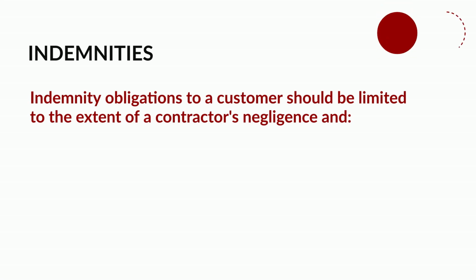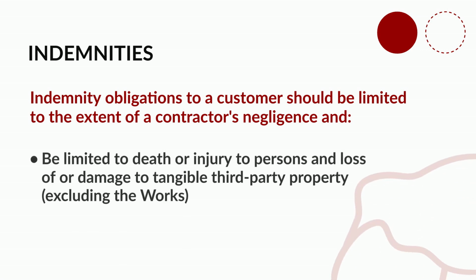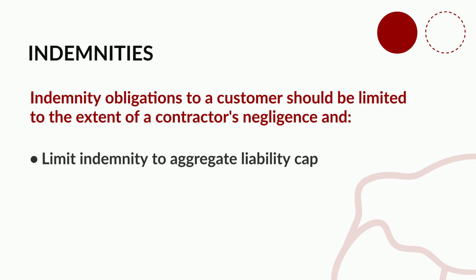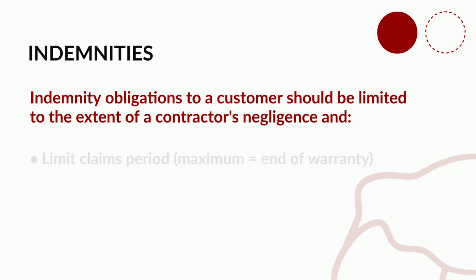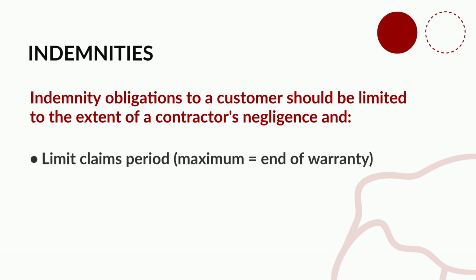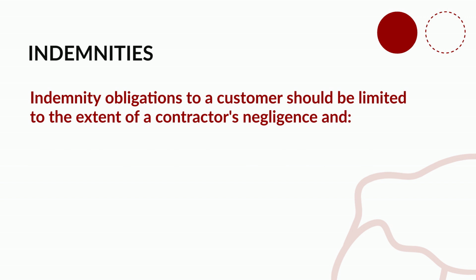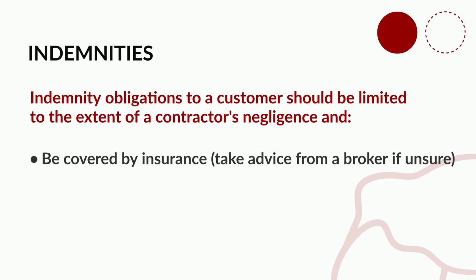Indemnities. Indemnity obligations to a customer should be limited to the extent of a contractor's negligence and be limited to death or injury to persons and loss of or damage to tangible third-party property, excluding the works. Limit indemnity to aggregate liability cap. Exclude liability for any owner's risks. Limit claims period, maximum equals end of warranty. Be covered by insurance, take advice from a broker if unsure.